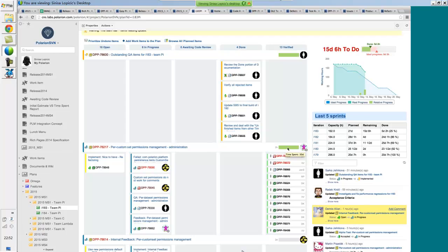And then once it passes the code review, it goes to done, where it then gets tested or anything that is required to ensure the quality of the user story or the task completed, and then moves to verified, where the product owner or whoever is the owner of the story has to close it by verifying that they got what they basically asked for. So this is again one of the very common sprint boards that we have that is actually in progress right now.